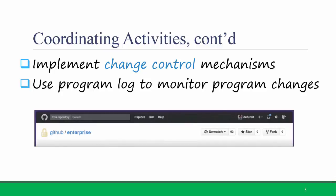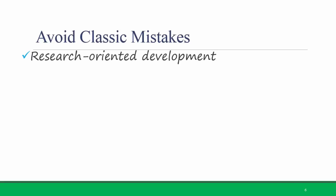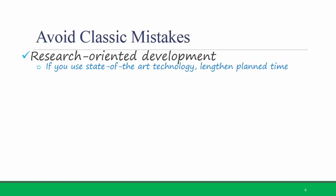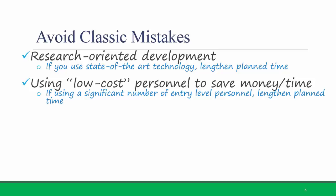You can find out more about control mechanisms and program logs by visiting the Wikipedia page linked here. Here are some classic project management mistakes that occur during the programming process that you should try to avoid. First, use research-oriented development — that means if you're using new, state-of-the-art technology, lengthen the planned time it will take to implement it, as new technologies have less documentation and so there can be more surprises or misunderstandings. A second classic mistake to avoid is using low-cost personnel to save time and money. Experienced programmers can complete as much as 5 to 8 times as much code in the same amount of time as new programmers, but they often only cost about double the rate of entry-level programmers to employ. If you do decide to use a significant number of entry-level personnel, lengthen the planned amount of time that it will take to complete the project.